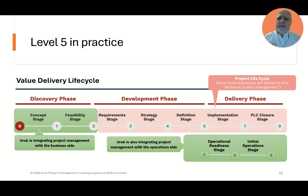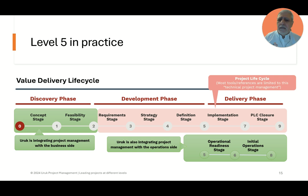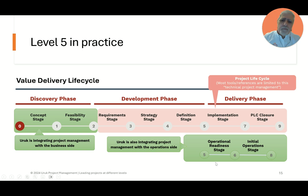A typical lifecycle view graphically: the pinkish area is a typical project lifecycle per level three — starting with a charter and ending with closure, with the product delivered at the end of an implementation stage. Then we add the green area: the discovery phase work early on, and the operational readiness work that comes in parallel later. That is a visual of level five in practice.